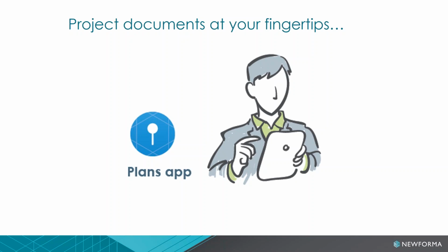And even add in, if it's an action item, if project to do, if I assign it to someone, give it a due date, put in some details. For punch list, I can put in things like spatial index. So, exactly what room or area that it happens to be in. And in both cases, I can add photos, multiple photos. I can mark up those photos, and it will also include a part of the sheet that I happen to be zoomed into on the iPad. So it would give reference from the sheet, but it would also be able to include photos.